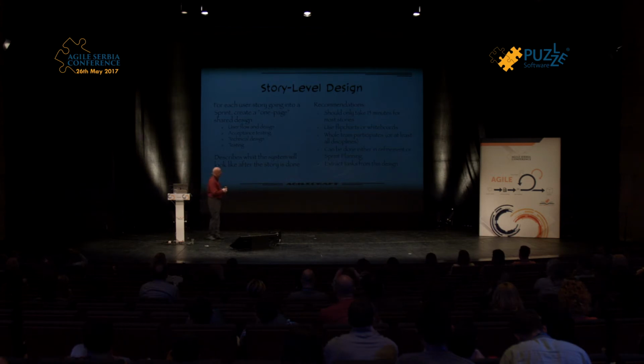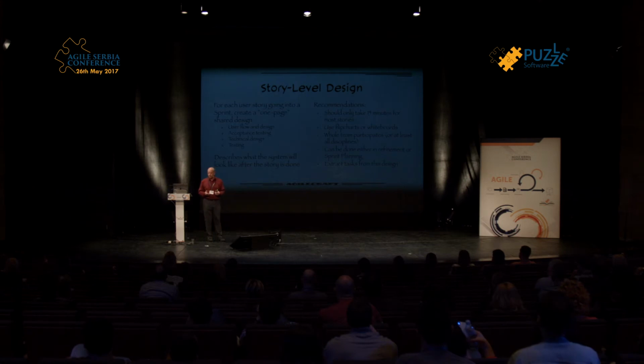This work, I usually have people do it at the latest in the sprint planning meeting, but it's actually a pretty good idea to try to start drafting that sheet of paper already in refinement meetings. Because once you refine it, you probably come up with questions. And if you don't do it in sprint planning, you do it before, you have still time to clarify before you have to commit to it.